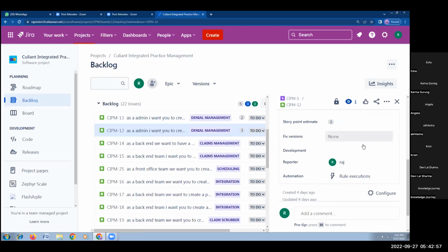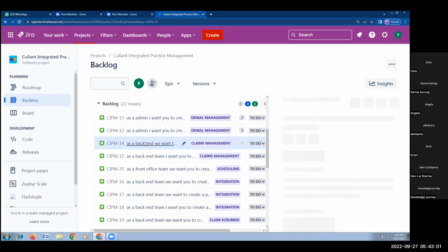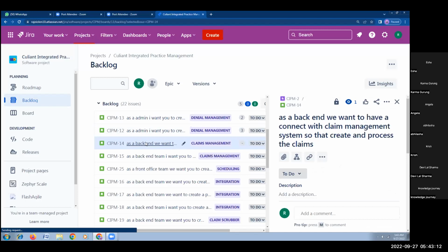Last time also I explained it to you. In the poker gaming technique, the card, meaning whatever user story we have, will be rotated to all the people. We ask people to provide a number based upon the complexity they feel. If it is less complex, give a small number. If you feel it is highly complex, then you can provide a high number. That's how generally we see it.